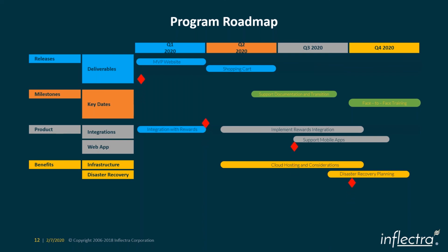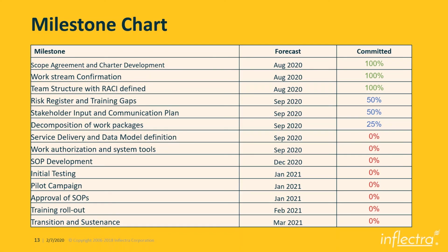And so now you start introducing what is called a milestone that basically says, I need so much investment, 25% of the budget available at the initial thing, and then as functionality is getting released, I need so much money, and different dates that drive how payments and fundings are going to be accommodated at the program level. Okay, that's one approach of the somewhat medium level program roadmap.